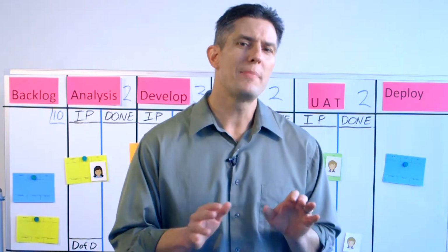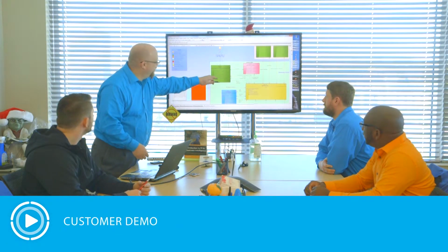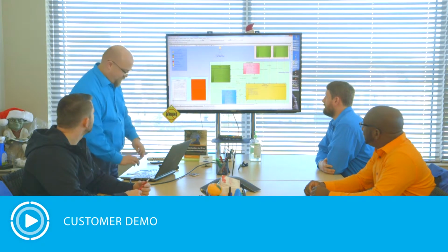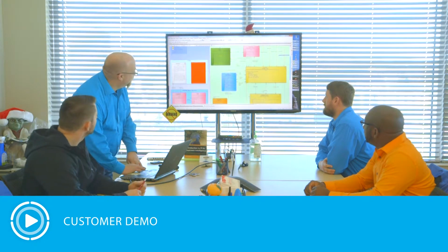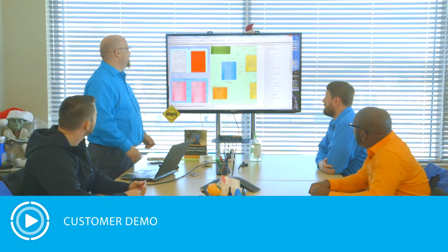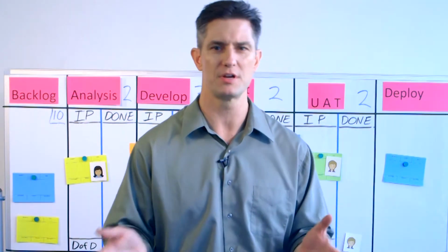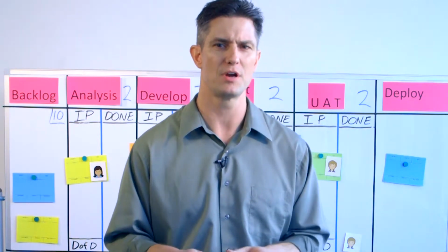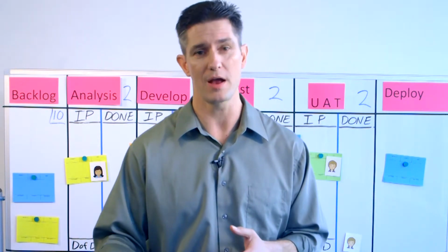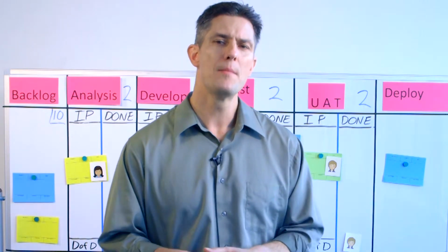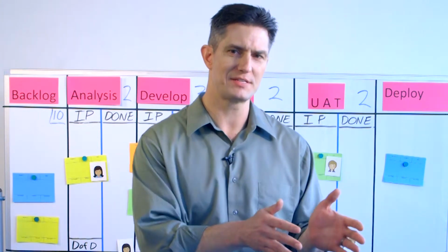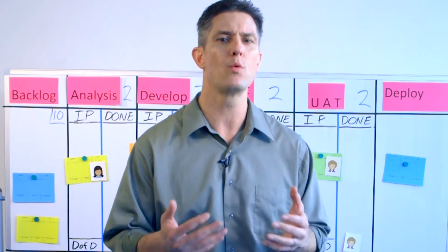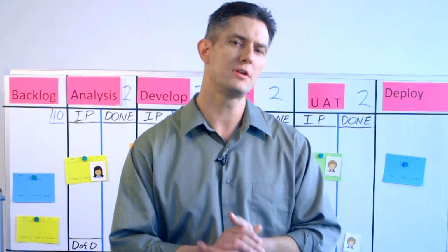On more of a weekly or bi-weekly basis, the team holds a customer demo. The purpose is for developers to show their work on a regular basis and get early feedback on it before it's too late for change. Sometimes a demo is a big deal and you will invite stakeholders and business SMEs, managers, and others. Other times, though, you may have purely internal or technical things to show, and it may be a quick review with the product owner or team. Many teams have a ready for demo process activity on their Kanban board to show what work items are ready to be included in the next demo.